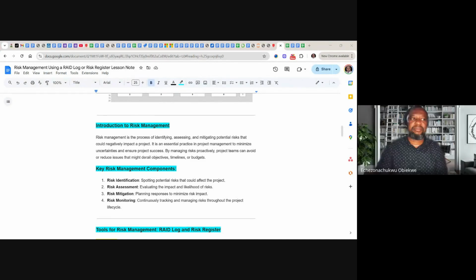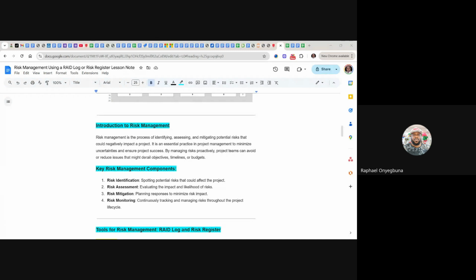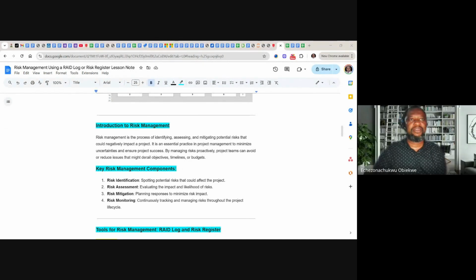Yeah, it's possible. For instance, if you're on an IT project and there's a developer who is highly skilled, and it's a shared resource among other projects, you have to work with his availability, because if he's servicing your project and also servicing others, and also supposed to go on leave, you must work around his time availability. And if something happens and he's not available, then it's automatically going to affect the project.